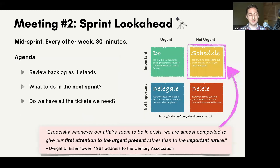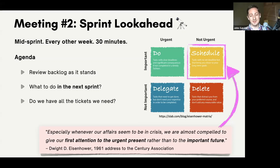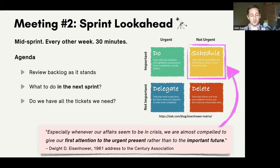Meeting number two is the sprint look-ahead. We work in two-week sprints, so every other week we have our mid-sprint look-ahead — and this is a really nice productivity tip. Dwight Eisenhower said: 'We're almost compelled to first give our attention to the urgent present rather than the important future.' The sprint look-ahead is basically a hack to protect us from ourselves and focus on the non-urgent but important things. It's so much easier to decide what's important when it's a week away versus when the sprint starts tomorrow and everything feels urgent.